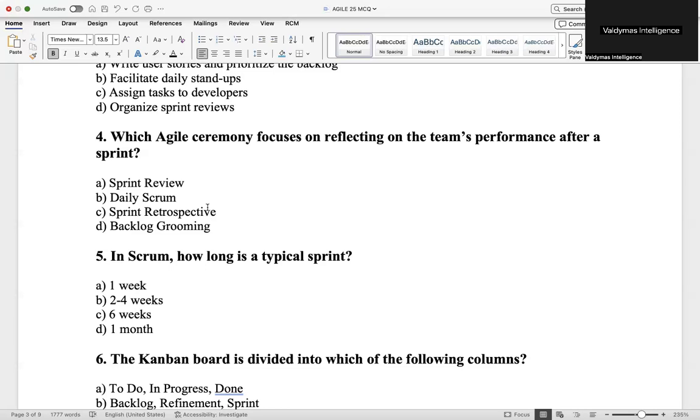Remember, that's when I told you the product owner will invite the business, stakeholders, customer, everybody, and we will test what we have developed to see if it's based on what the customer wants. If the customer is satisfied, we're good. If they are not, they tell us what is outstanding, and then we go work on it again and call them for another sprint review meeting. You understand? You're correct, sir.